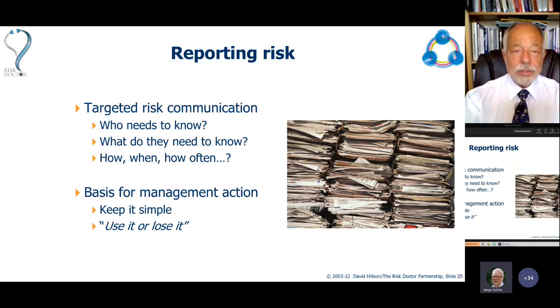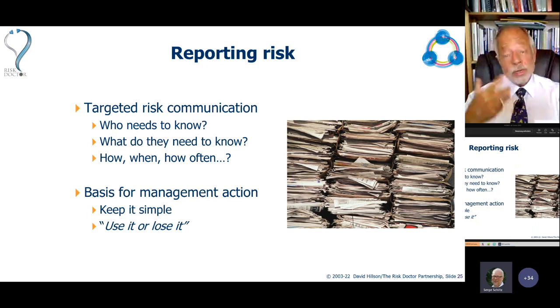So you'll see that the risk management process is quite simple. It's based on asking and answering those 6 questions. What are we trying to do? What could affect us? Which are the big ones and what could we do about them? Once we've done it, did that work and what's changed? And the way of implementing each of those questions can be quite simple and straightforward, or it can be more detailed depending on the challenge of the project.